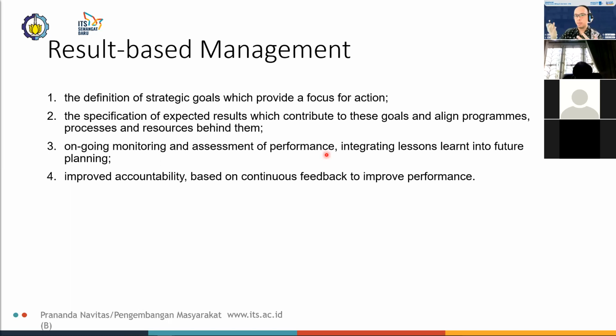So you might dial it down and say, all right, 10,000 books is too much. Maybe with the physical structure that we have right at the moment, we can only expect to accommodate 5,000 or 3,500 books. So that's how I would illustrate the integration of lessons learned into future planning. Of course, future planning with regards to the community library project.